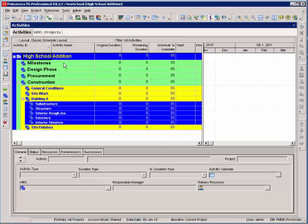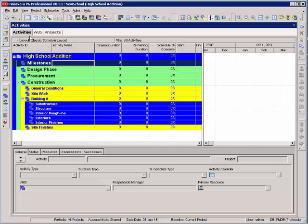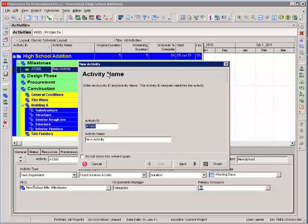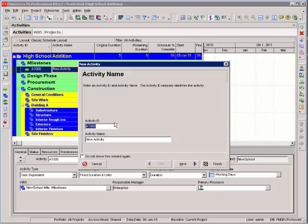We'll begin adding the activities from this list. From the activities tab, I'm going to select the heading where I want to insert an activity. I can do that by pressing the insert button on the right. You'll notice an activity wizard pops up.